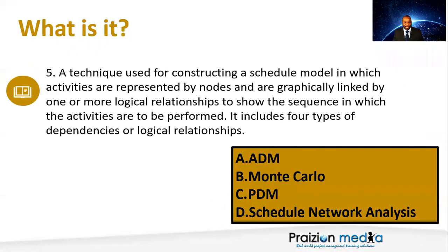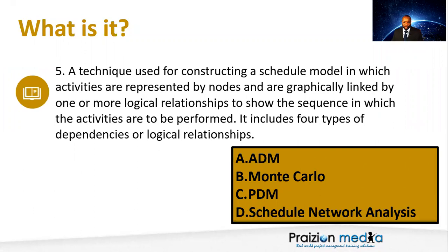Okay, here we go. Number 5, a technique used for constructing a schedule model in which activities are represented by nodes and are graphically linked by one or more logical relationships to show the sequence in which the activities are to be performed. It includes 4 types of dependencies or logical relationships. Is it ADM? Is it Monte Carlo? Is it PDM? Or is it schedule network analysis? Well, if you guessed PDM, precedence diagramming method, you are correct.